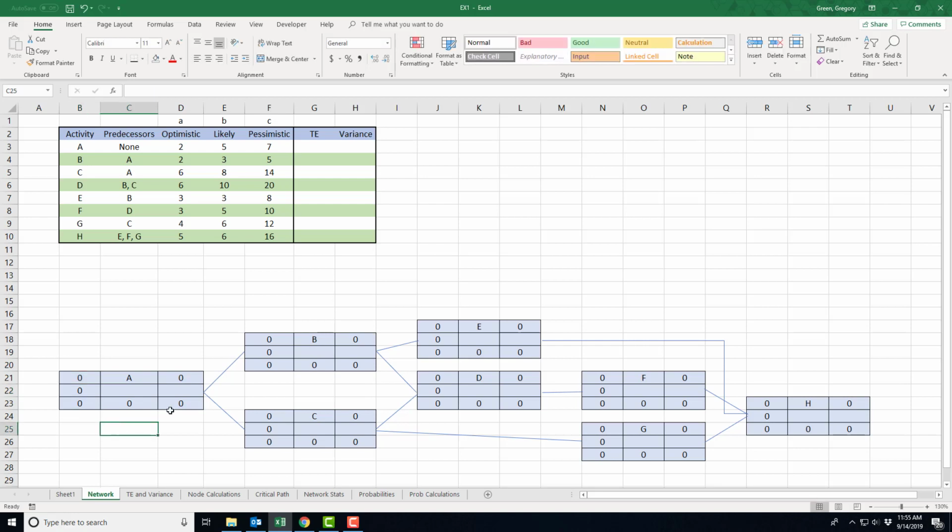Okay. Now, what we have not done yet is give an assignment to these 2 nodes that I'm highlighting right now, because we've got a lot of work to do before we can do any assignments for those nodes. So I've got to work from left to right through every node, assigning the early start time. I can think of that as needing to go through every node and calculate this early start time. Well, I've already done it in my picture.